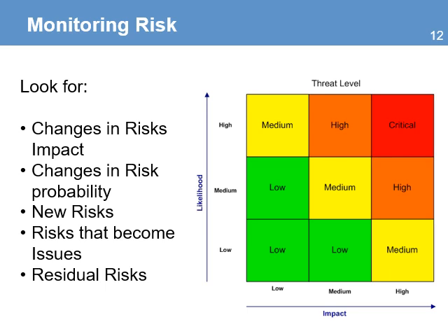For example, you have a risk that originally had a low impact with low probability, but now it changed to high probability and high impact. The original strategy will not work for that risk anymore, and you will need to change the strategies. This is an exercise that needs to happen on a regular basis, especially at the end of each cycle.